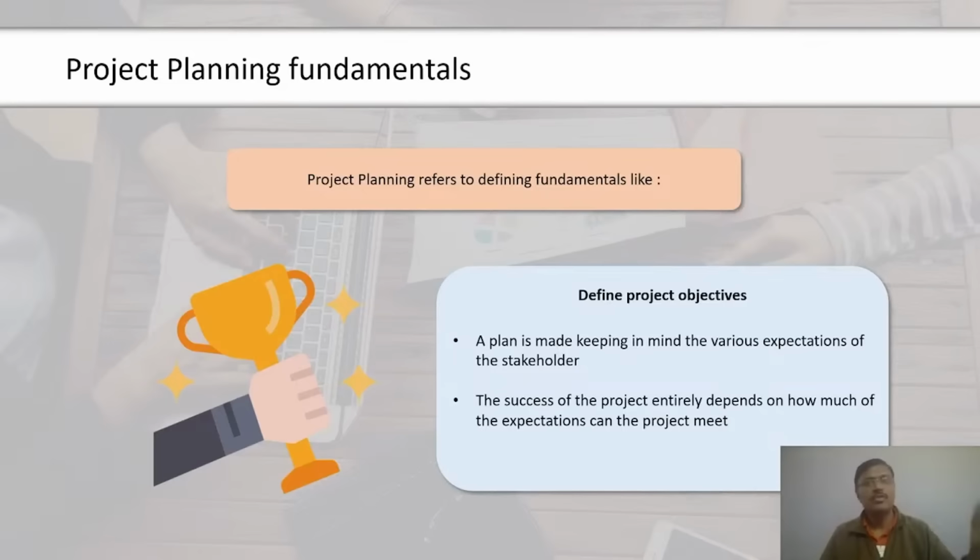Which will help in analyzing the tasks to complete the project and the time required to complete those tasks. We call it 3-point estimation while analyzing this: optimistic, pessimistic, most likely estimates, and accordingly what would be the estimate of the duration, which we use in terms of planning. Then work breakdown structure, I guess we went through it in detail already.